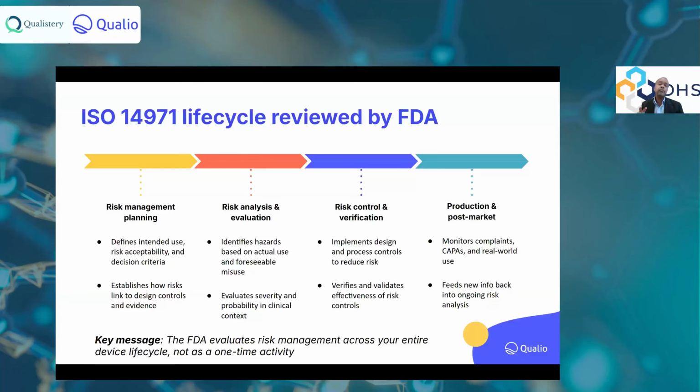And that tells you the pre-mitigation risk. And that tells you whether you need to put controls in place to address the risk or not, right? So things are fed into the engineer from the risk team, and they're able to take their design to the next level, identifying controls they have to put in place, and only those, so that time is not wasted, money is not wasted on putting in controls not required. More important, you don't miss putting in a control for something you need to put in place.